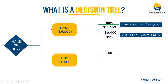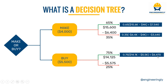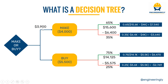The same applies for the buy option. If things go well, there is a 75% probability of making fourteen thousand one hundred and twenty-five dollars. If things do not go your way, there is a 25% probability of losing five thousand five hundred and seventy-five dollars. Multiplying probability by the difference gives six thousand four hundred and seventy dollars for success, and a loss of minus two thousand seven hundred and sixty-nine dollars for failure.